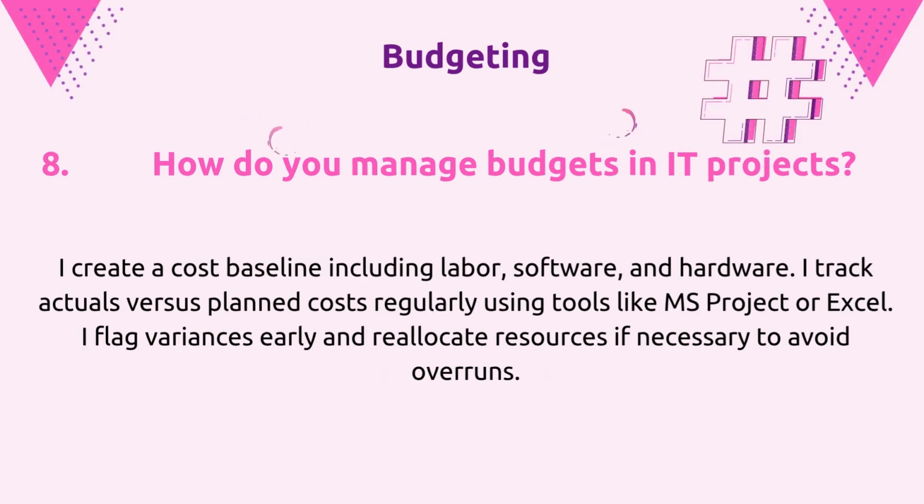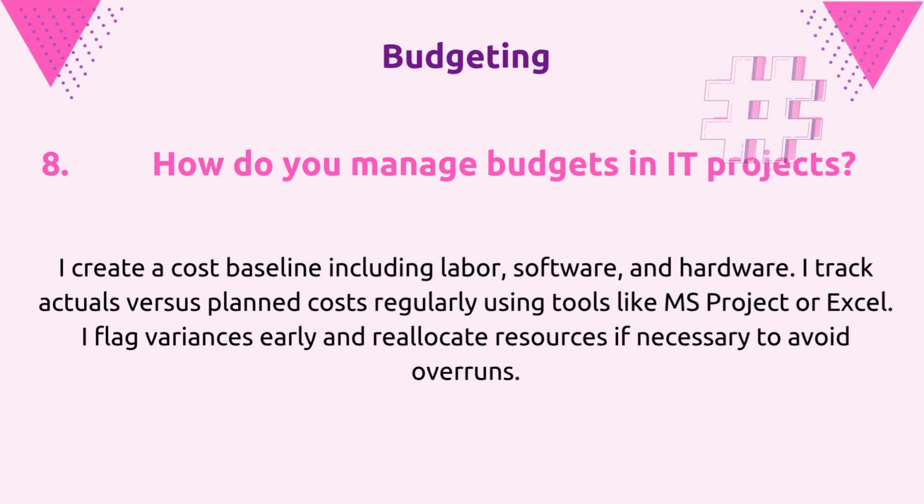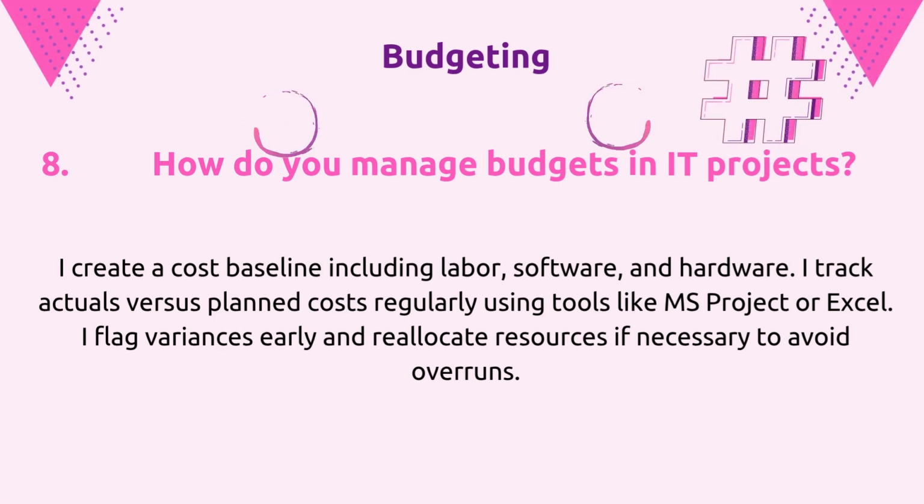Question 8 related to Budgeting. How do you manage budgets in IT projects? I create a cost baseline including labor, software, and hardware. I track actuals versus planned costs regularly using tools like MS Project or Excel. I flag variances early and reallocate resources if necessary to avoid overruns.